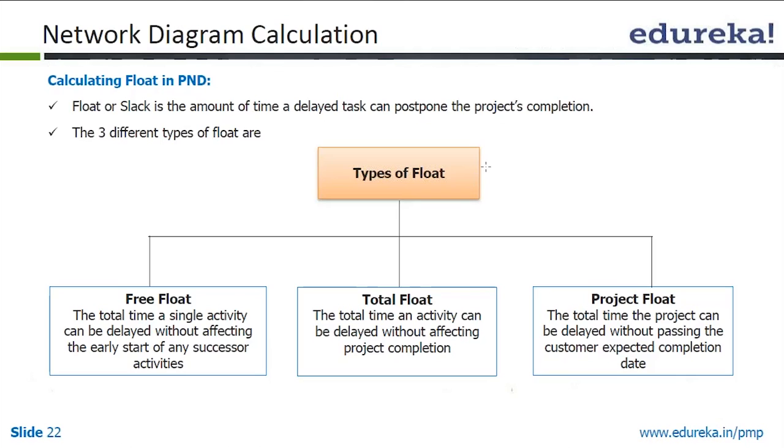So you are tracking with respect to that for all practical purposes. But you also see whether you are eating away the reserve that you have kept to meet the final completion that is committed to the customer, to ensure that you still have some buffer to be able to get the project delivered on the committed date. So that is project float.